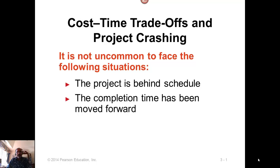Project crashing means we reduce the time required to complete the project. We would do that when the project is behind schedule, or if there are financial incentives to finish the project early. There may be bonuses awarded if the project is completed before the due date, or penalties if the project is not completed on time.